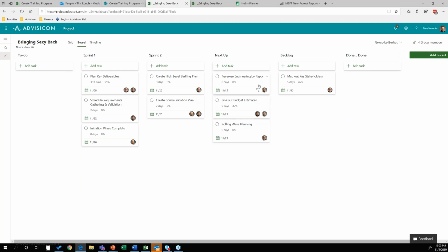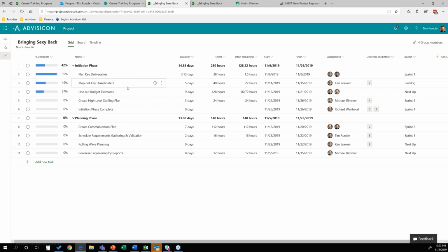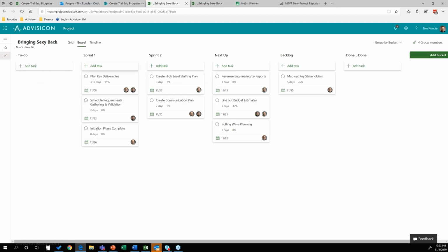Done. So as you work in the environment of having project task details, when I go to my grid, some questions surface, which is, hey, you're building this, but if you add resources or hours, what kind of task structure is this? And by default, for those of you that have used Microsoft Project, the professional or what I call legacy, all the tasks here are basically effort driven. And as you put them in here, its default is fixed units, effort driven. And so if you're thinking about that and applying this, it'll help you understand a little bit more of how the hours are calculated when you add or take away resources. But by the way, that's the default that's in Microsoft Project. Some people may not even care about much of this. They just want to make sure things are getting done and they can work from the view themselves.